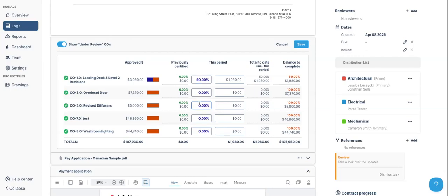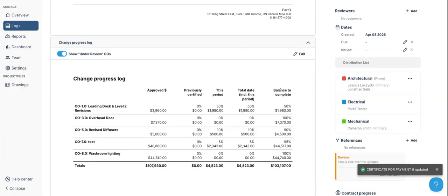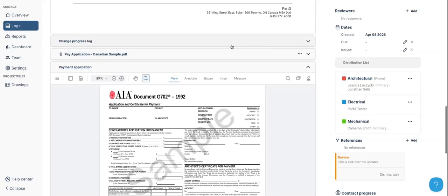So similar to a schedule of values, this is information that normally the general contractor is presenting you with anyways, but human error is the thing. So we want to make sure that we're not letting you proceed past the dollar values entered. If they've entered a number incorrectly, missed a decimal, missed a number, then we're making sure that we're aligned with what was actually issued. So this is just a double check for you. You can always turn that off if you don't want to use it.